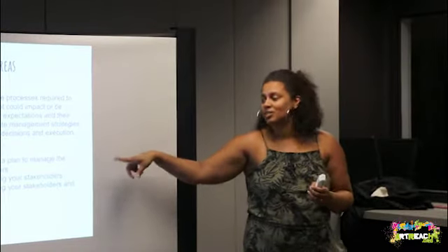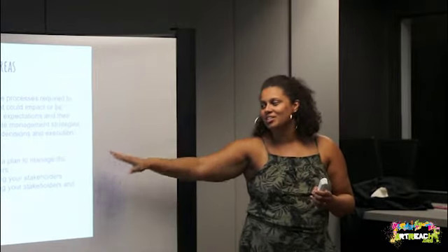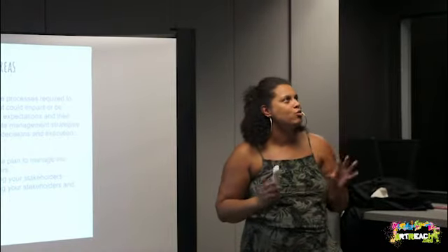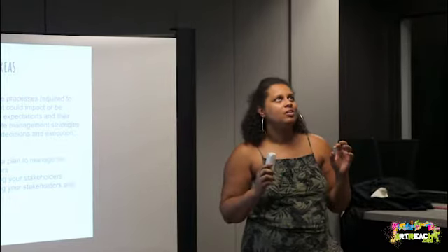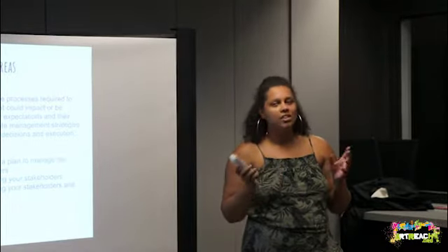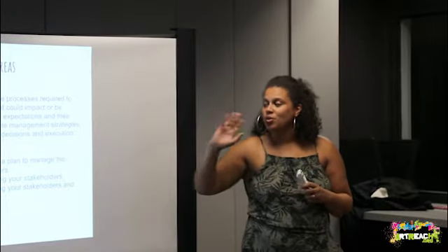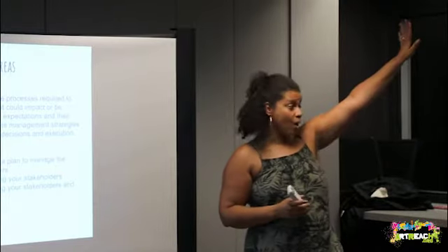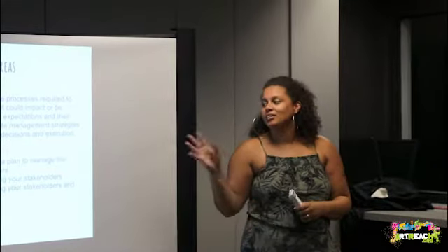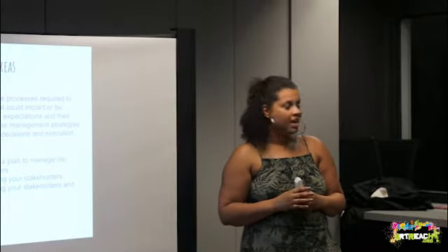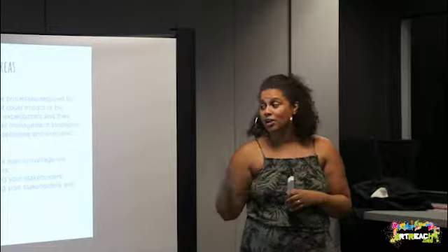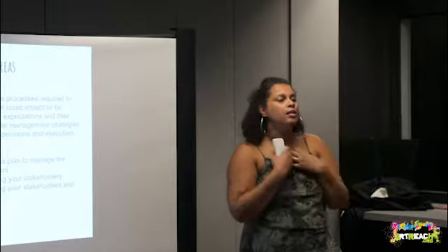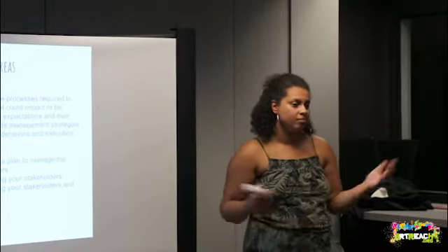When I did a class, my professor told me this crazy example about a project. I can't remember who was doing it, I think it was a university or a public thing. Actually, I can think of a similar example I heard about. There was a festival, I think it was a Way Home festival, and they had it way out in wherever. They failed to identify their stakeholders, aka the community that surrounds it, and that community petitioned and said, yo, that's too loud, you're not listening to us, and the city shut it down. That's it. Wow. There's your project.